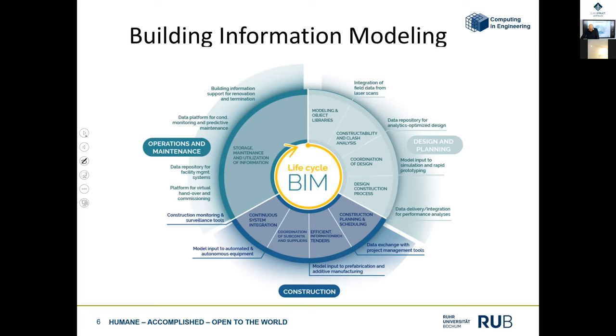Therefore, to consider this whole process, you need to set up a step to define the so-called information requirements, because besides the physical asset, the bridge in a physical way, we want to create a digital bridge. And therefore, we also need planning, like you have a planning for the physical bridge. So we have to plan the information, how we can collect this information, how we can store it. So this phase must be integrated at the beginning.